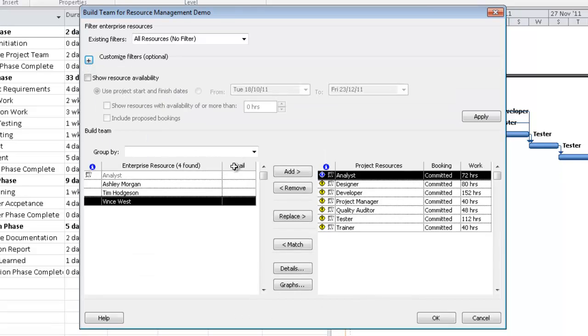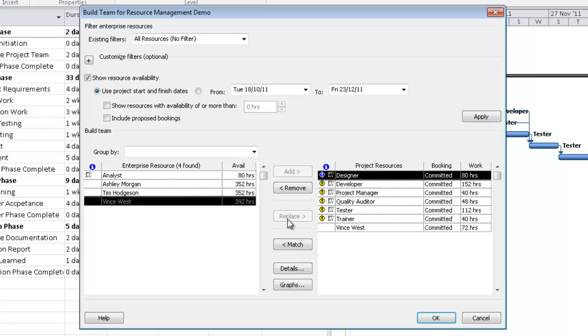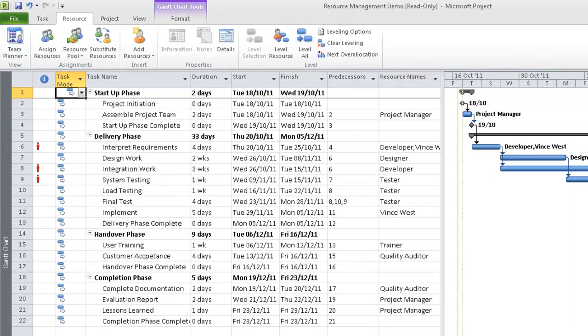Another thing that's not being displayed at the moment is availability. To show that, I select Show Resource Availability. I'm going to use the project start and finish date. In the real world, you might drill down to exactly when the work needs to take place. If I hit Apply, I can see how much availability each of these resources has. To replace the generic resource with the named resource, I simply hit Replace, and now we have Vincent listed and the analyst generic resource has vanished. If I click OK, you can see that Vince's name now appears within the resource names column.